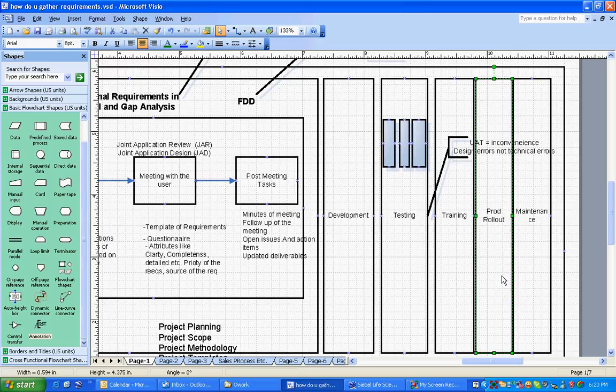Instead of giving them a shock on the production day, you call them beforehand. Obviously, for this to be achieved, the system needs to be exactly ready the way it should go into production. So usually it is right before production. You'll keep 2 or 3 days for user acceptance testing.